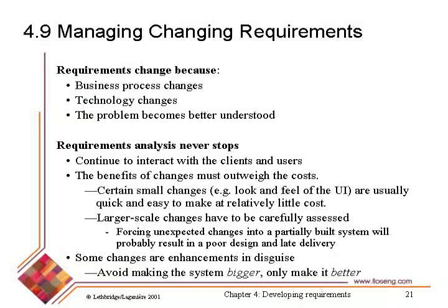You're going to go through the process of getting it approved by the stakeholders. It can be a quick process, a quick meeting of requirements changes that people have asked for in the last week. Can we make them or not? And by the way, as time goes on, each requirement change is going to become more costly.